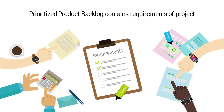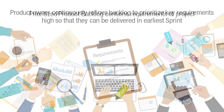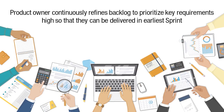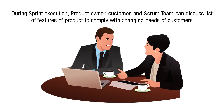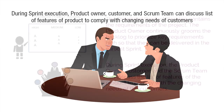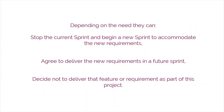The Prioritized Product Backlog contains the requirements of the project. The product owner continuously refines the backlog to prioritize key requirements high so that they can be delivered in the earliest sprint. During sprint execution, the product owner, customer, and the Scrum team can discuss the list of features of the product to comply with the changing needs of the customers. And depending on the need, they can stop the current sprint and begin a new sprint to accommodate the new requirements, agree to deliver the new requirements in a future sprint, or decide not to deliver that feature or requirement as part of this project.